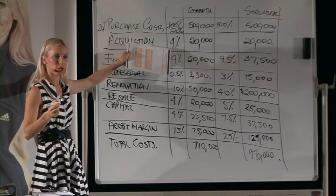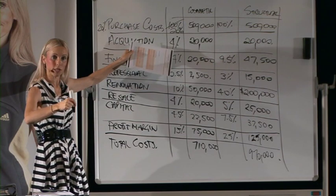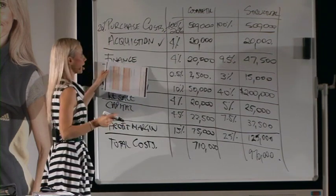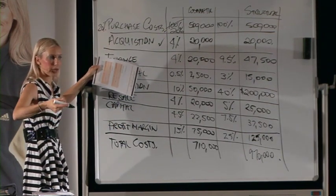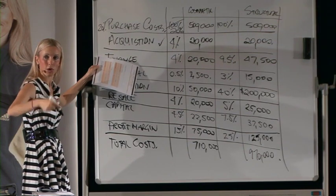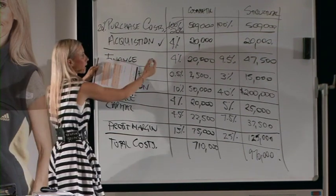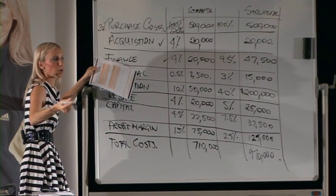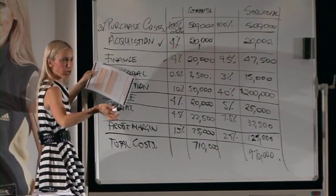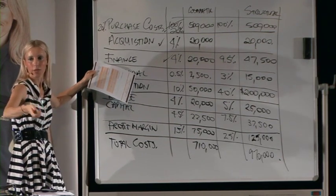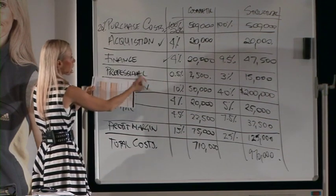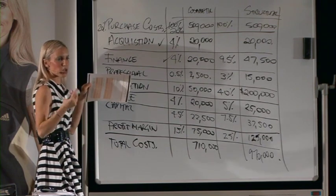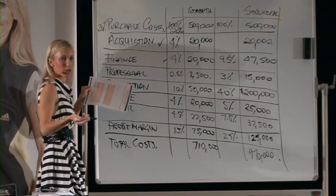Do you incur your acquisition costs — your stamp duty and legals — as a project cost during the project? Yes. So 20% plus acquisition costs, that you incur. Your finance costs, your holding costs — your monthly mortgage repayments — unless you do something creative like capitalised interest where you pay it all off at the end, in most loan scenarios for a normal residential house, you'll be paying month-by-month. So you incur that cost during the project. You've also got professional costs — surveys, due diligence — that's also a cost during the project. Yes.